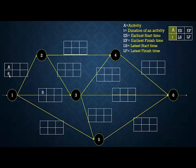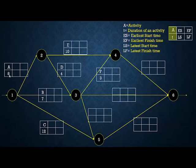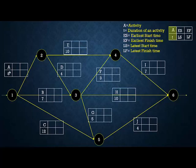Activity B takes 7 weeks, activity C takes 12 weeks, activity D takes 4 weeks, activity E takes 10 weeks, activity F takes 3 weeks, activity G takes 5 weeks, activity H takes 10 weeks, activity I takes 7 weeks, and activity J takes 4 weeks. All activities and their durations are now filled in.